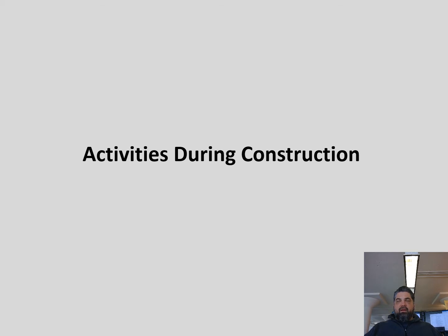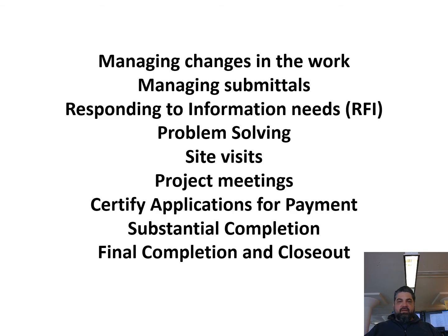So we talked about your typical responsibilities during construction. Here are some particular activities, right? So you'll be managing changes in the work. As much as you have planned, prepared, designed when you were doing your documents, there are things that are going to have to change. And so you'll be managing those changes as the architect in the contract documents. So it's important that you know that you're going to have to be involved in recording those changes and issuing supplemental contract documents.